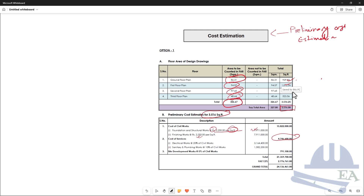For the cost of services: electrical works are estimated at 20% of the civil works cost — if the civil works cost is very high, this percentage may come down. Sanitary and plumbing works are at 10%. You add these two values to get the subtotal, and then add 13% VAT to get the grand total.